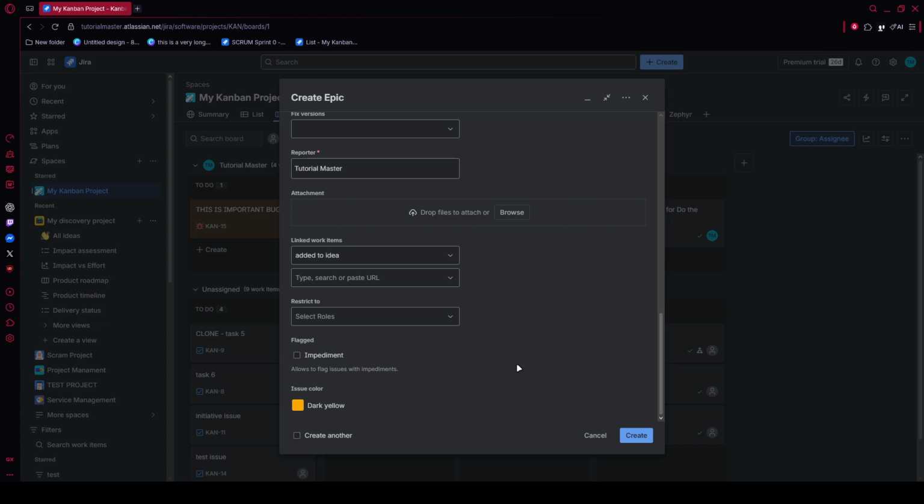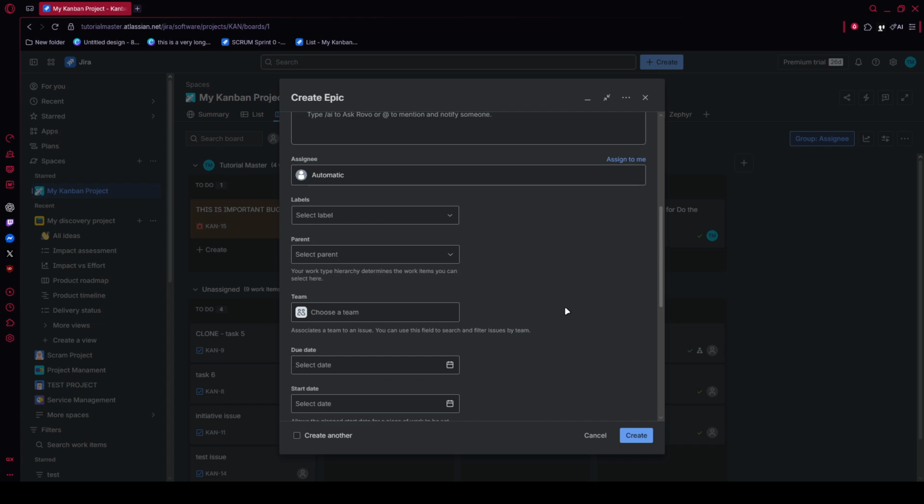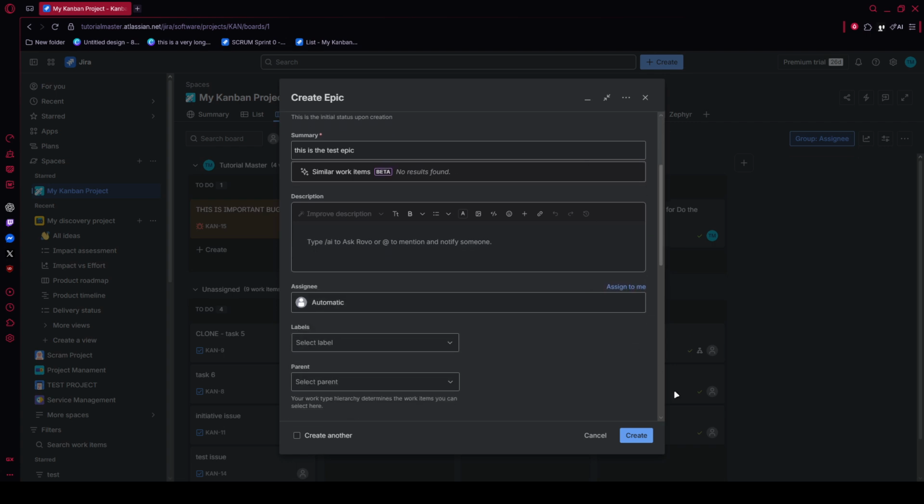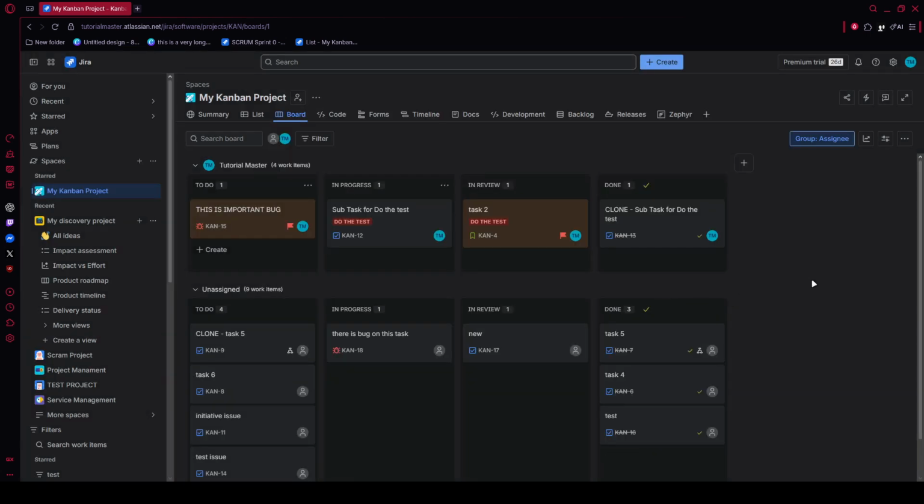After that, look at the issue key shown near the top of the ticket. You can use that key in your local Git workflow when creating commit messages. Add the issue key along with the appropriate status and a short comment in the commit message so Jira can automatically update the issue and log progress in the background. This saves time and cuts down on manual status changes in the browser.